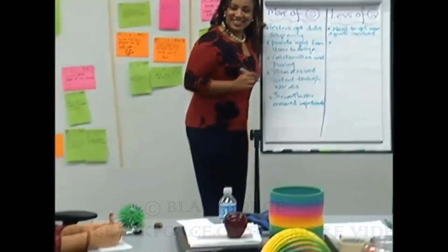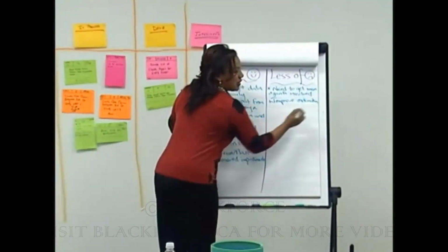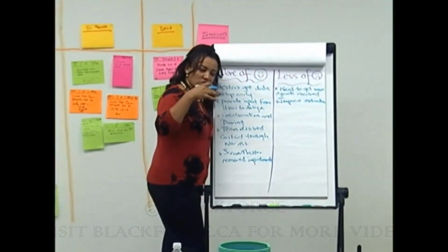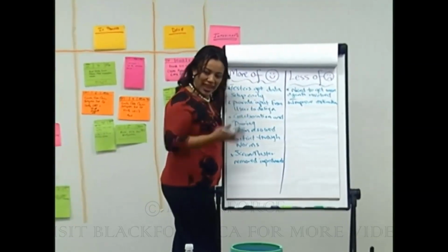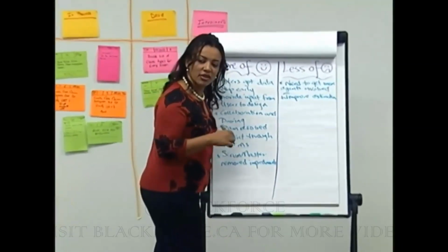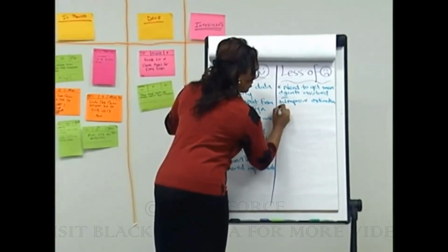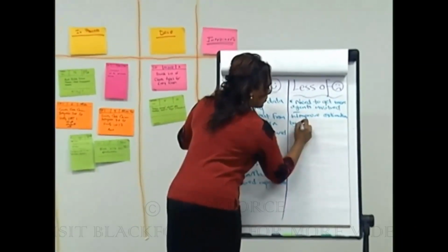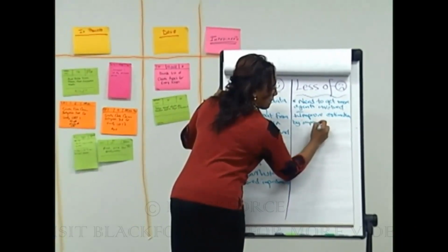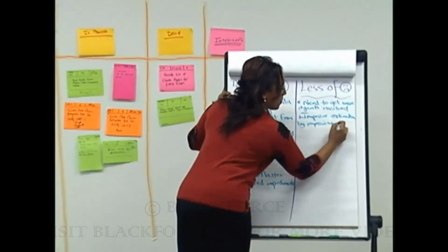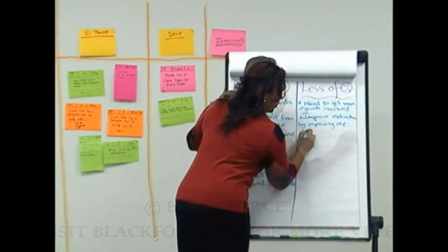I think when we did the task breakdowns, maybe we should look at the screens a little more in depth to make sure we get them estimated correctly. We were off on a couple of those estimates. Okay. And you're saying this is by improving pre-planning, or getting more details ahead of time or within the iteration itself? I think within the planning meeting. Maybe we made some assumptions during that meeting as far as what was actually expected, and we should have asked a few more questions to get clarification on those screens.